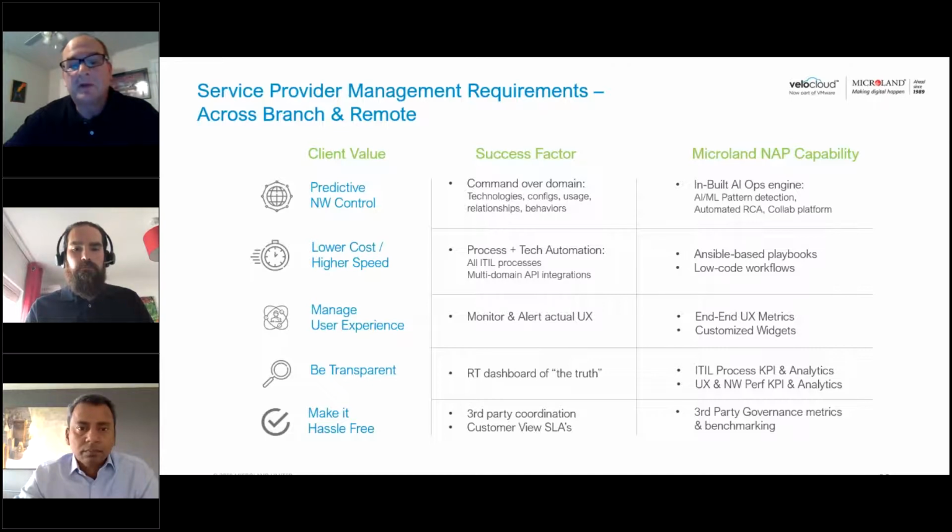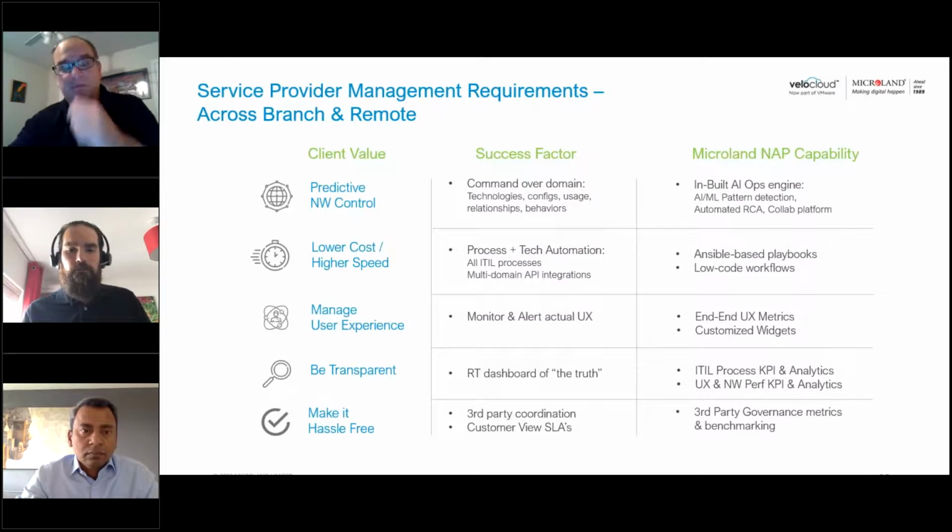Let's talk a moment about the requirements of this platform. What's it actually going to need to do for me? It's really 6 things. Number 1, I'm going to need to gather a massive amount of information from my existing estate. That's technical data, router models, configurations. That's site-level data about facility power, cooling. That's people-related data when we're talking about our remote users: where do they live, what are their policies. And also application data: what are the critical applications, either by site or by person, that we need to prioritize for user experience.